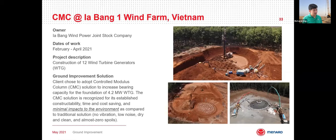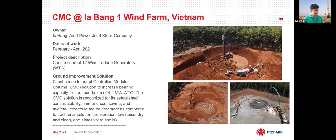Most recently — in fact, last month — we completed the construction of 12 wind turbine generators, where controlled modulus columns were used as the foundation system. The technique was selected for its minimal environmental impact and speed of construction. We were able to complete all 12 turbines in approximately two months.